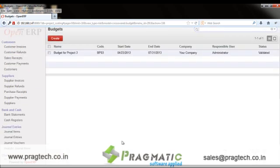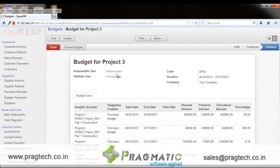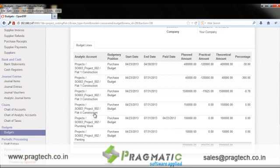Budgeting is a crucial part of construction. Users can define budgets for different projects as well as for each task. Here, for Project 2 and Sale Order 3, all tasks are listed and a planned amount is assigned to each. Cumulatively, this gives the total budget for the project. The practical amount reflects what has actually been consumed versus the planned amount, and a percentage shows the variation between planned and actual spend.